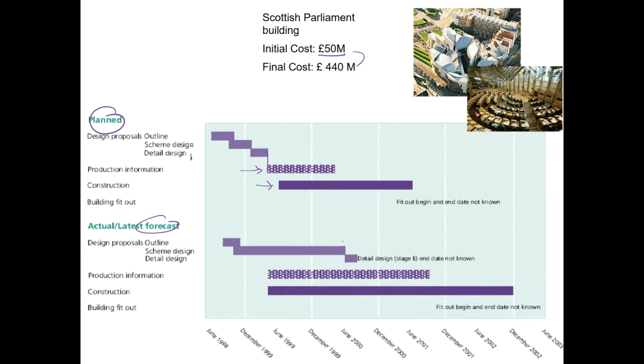So you can see that the design is running parallel to construction. So basically, we are on site, and still the designs are not complete and not clear as to what has to be done. The scope is being changed. As a result, you could see the consequences. So a key message which we could learn is that it is very important to do our thinking before we go on site.